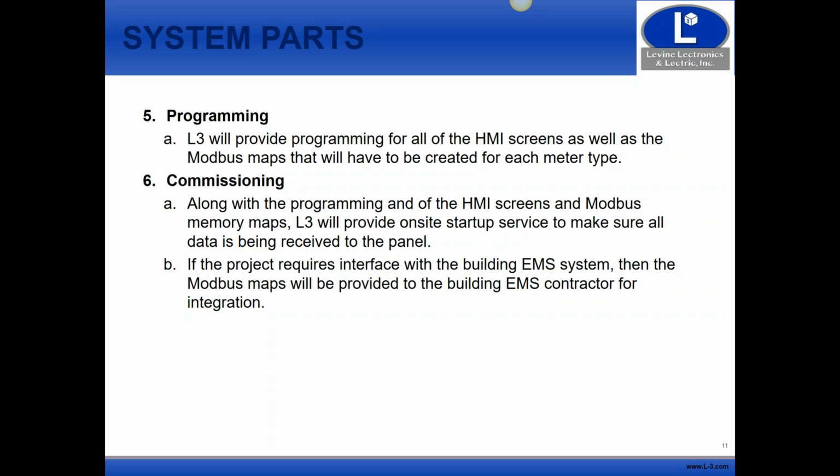We have had a couple of instances where we were just asked to provide equipment. The equipment was provided, it got installed, and when it got time to finish the project out, the contractor says, okay, now we need to make this work. When are you coming out to do it? And that was never included. Now we're scrambling to go and actually get that part done. So we don't do that anymore.